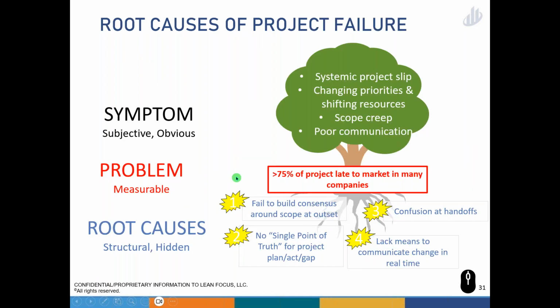So, how have we solved the problems that we've done here? Well, we talked about failing to build a consensus. Well, through the process, we've used a week and gotten together and looked at every detail of this product with a group of people sitting around the room who are going to go implement that project. Everybody understands what they're in for. The project manager hasn't set some schedule that people are introduced to and told they have to go do. They signed up for it. It's a team. It's not one person telling a bunch of other people what to do.